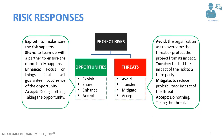In the next slide we will talk about risk responses. We divide project risks into two categories. The first is positive risks, which impact the project positively, called opportunities. The second is threats, which impact the project negatively. The strategies for opportunities are: exploit, share, enhance, and accept. For threats, we have: avoid, transfer, mitigate, and accept.